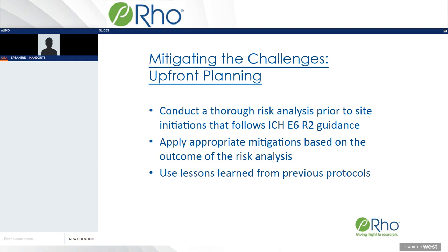You might be able to eliminate some through some fine-tuning of the protocol, which is why it's really important that this step is implemented before you finalize your protocol. Any risk that can be eliminated just by making a change to your protocol before finalization is certainly helpful. And then there are some risks that we really can't eliminate, but you can manage those risks.